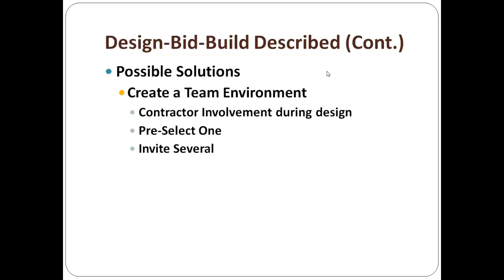You can invite several, and I've done this as a pastor, where we invited several and gave them the opportunity to bid on it. Part of the invitation to bid on a select number of GCs, 2 or 3 or 4, was that they had to help you by giving input to the design cost. So you were doing this back at the master planning, and then at 30%, 50%, they were helping you make certain that you were within budget.